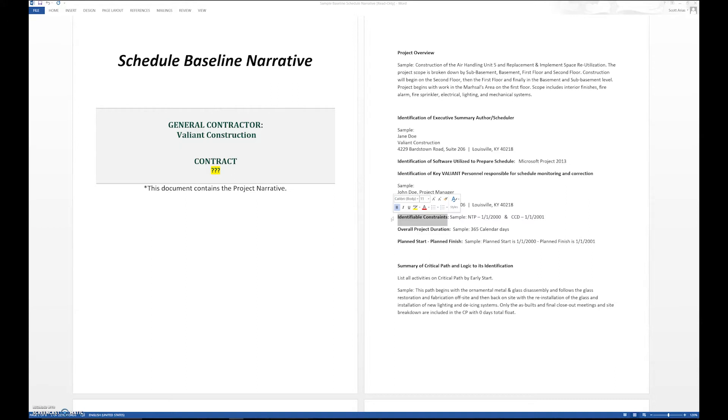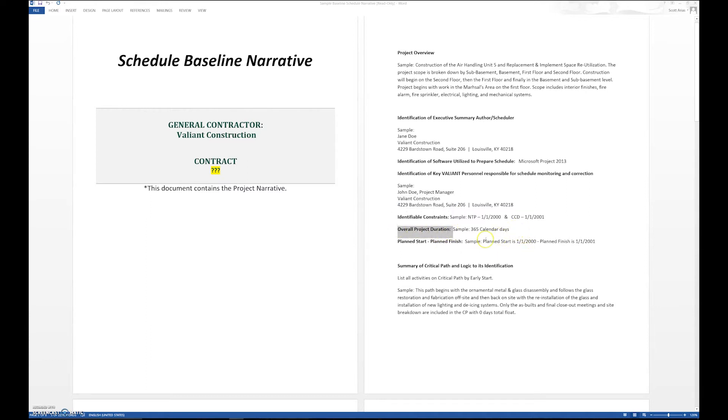If we have a project phase that has constraint dates in it, this is where we would put that information. We want to identify the overall project duration, and we did that in calendar days because that's how we're given a project. We want to put when we plan to start it and when we plan to finish it.